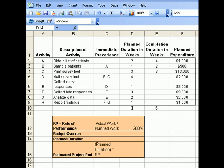Before doing the budget overrun for this assignment, let me tell you about two other things: the planned duration and the estimated project end. The estimated project end can be solved by taking the project duration and multiplying the rate of performance — that gives you the estimated time when the project is going to finish. To get the planned duration, you take the total number of weeks for all activities minus the total number of weeks of activities that do not fall in the critical path.